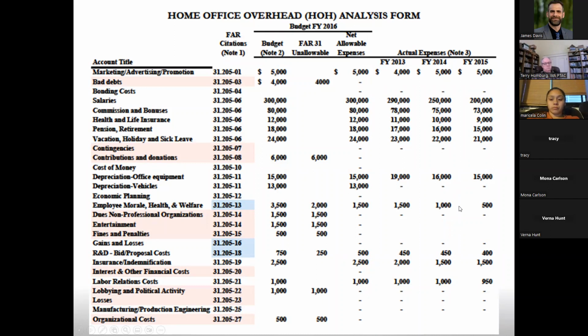You fill it out to the best of your ability. They're going to say, what's your budget now? How much revenue do you think you're going to be making this year? And you're going to divide that. So they're going to say to you, what do you expect to do in revenue? If this is the only job you're going to get, then basically you're going to have almost 100% markup for your G&A, because you've got nothing else to charge it to. But as your revenue comes in, of course, you're spreading that cost percentage-wise, dollar for dollar. So they just want to see that.